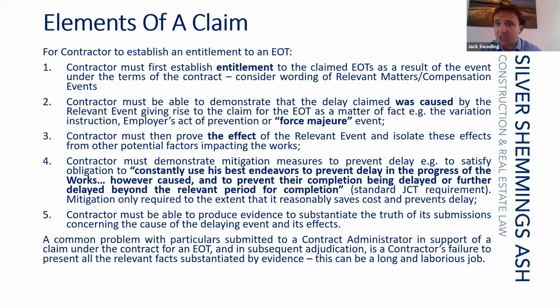and that those facts be substantiated in the event that they are challenged. And special consideration needs to be given to the fact that if this is a dispute that's being referred to adjudication, then the adjudicator will be coming at this completely cold. They don't know the background to the works. They don't know about all the things that have been going on on site, and the contractor, by referring a claim requesting an extension of time due to a dispute, carries the burden to prove its entitlement.